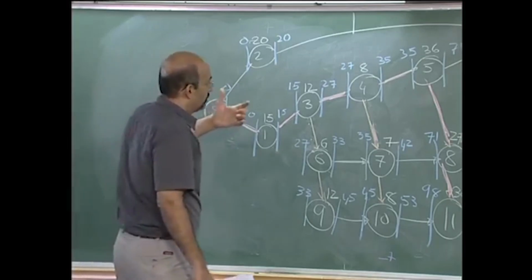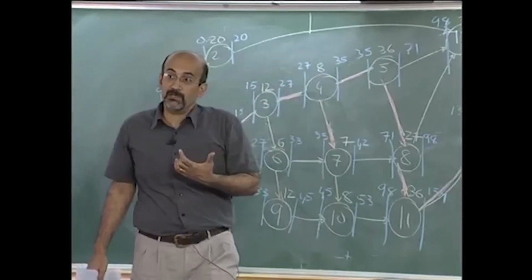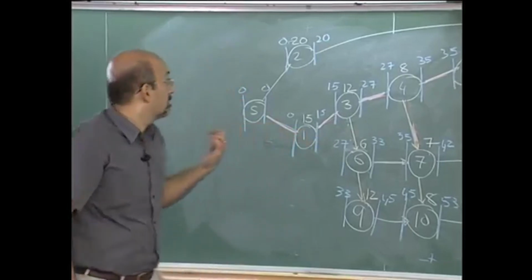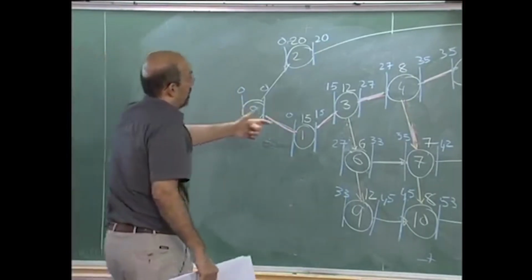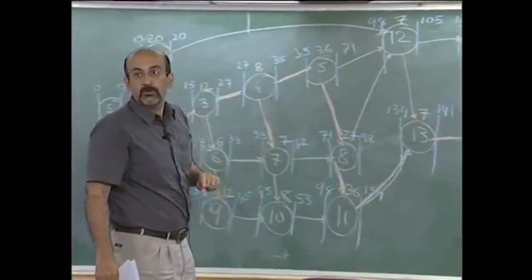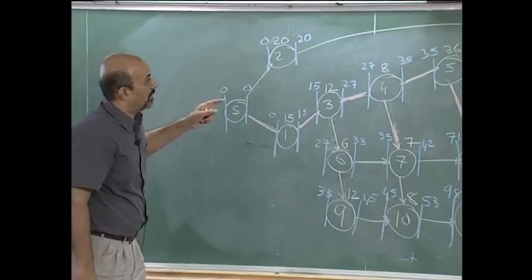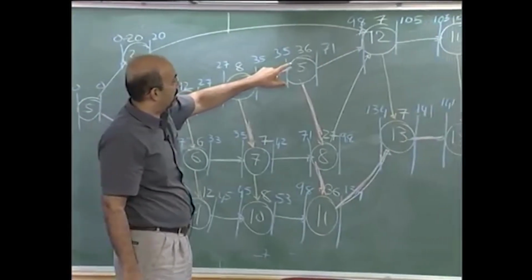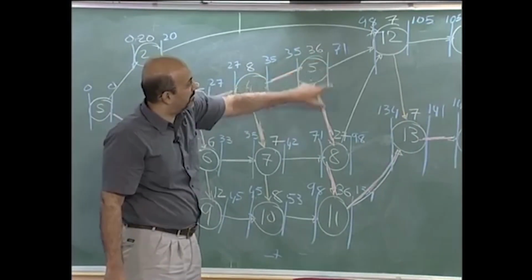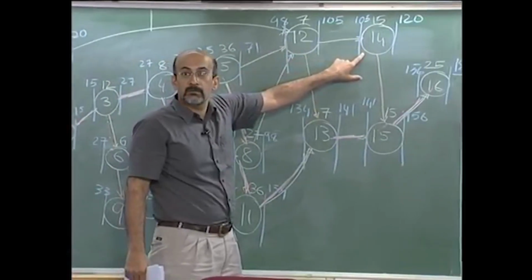For example, when you get into float, in the other case, how many activities are critical? Almost all were critical except for a handful. Here there's only 1, 2, 3, 4, 5, 6, 7, 8, 9 critical. There are quite a few off the critical path. After I actually get my east span placed, of course they get critical, but for example this deck then becomes non-critical.